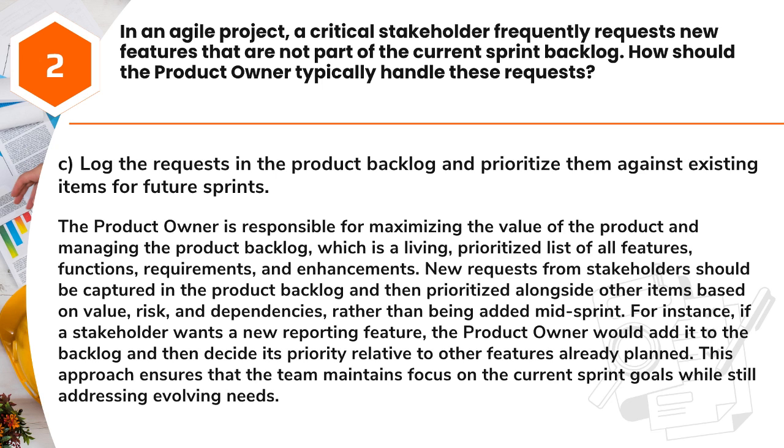For instance, if a stakeholder wants a new reporting feature, the product owner would add it to the backlog and then decide its priority relative to other features already planned. This approach ensures that the team maintains focus on the current sprint goals while still addressing evolving needs.